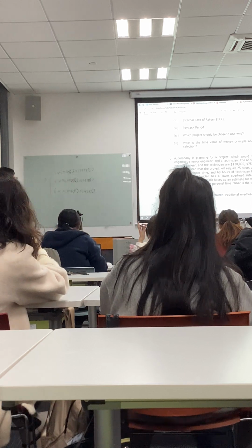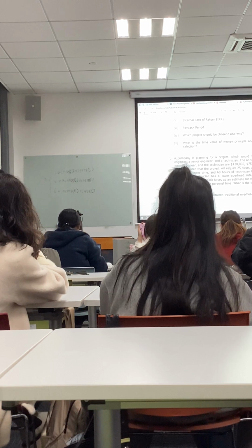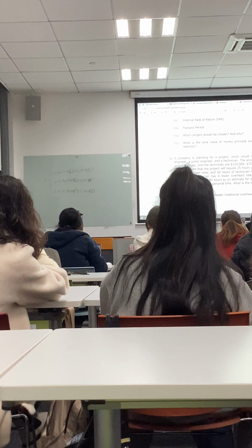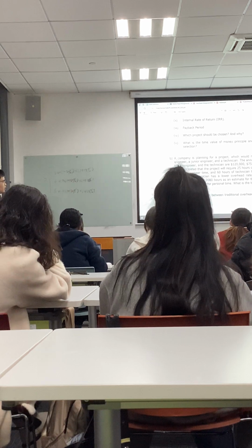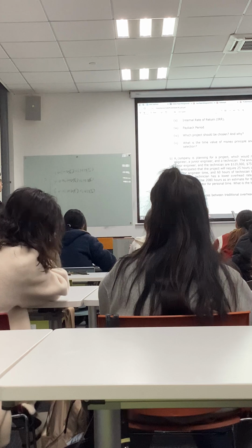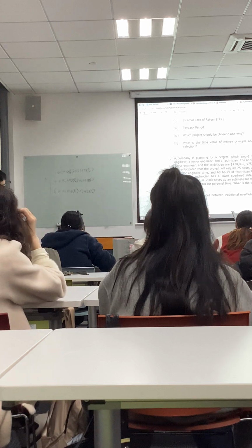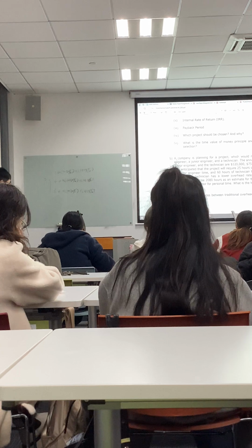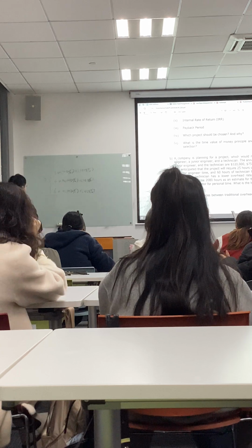And next, another thing we need to derive is the rate, right? This is the total amount we use of these three types of staff. Next thing is the rate, right? So the annual salary we have, and also the yearly working hours we also have. So every hour, how much we have.